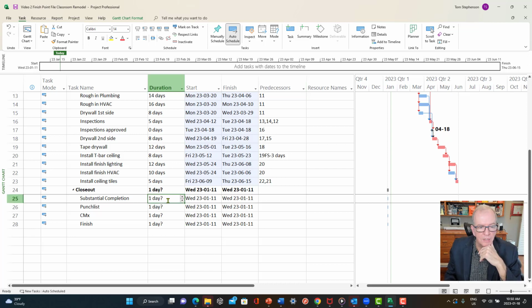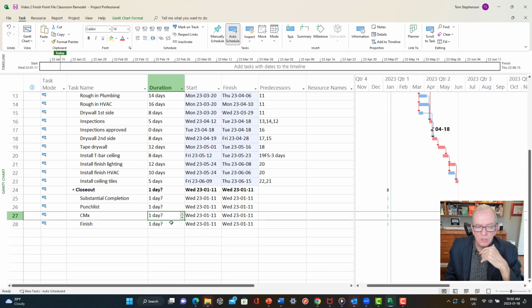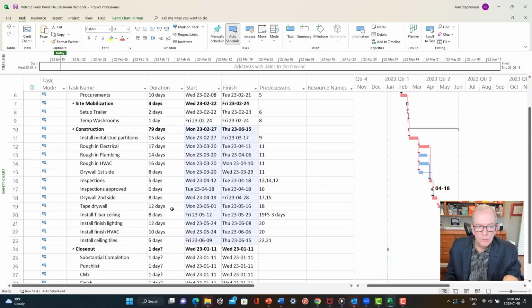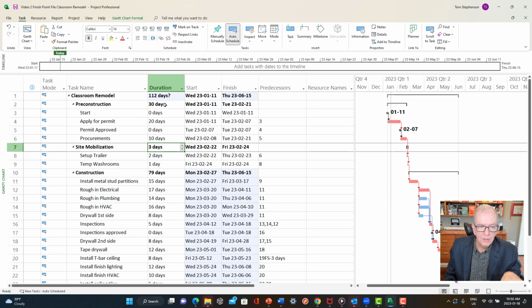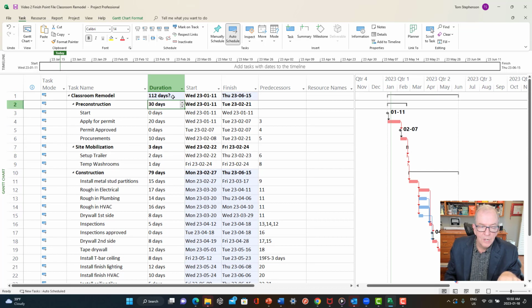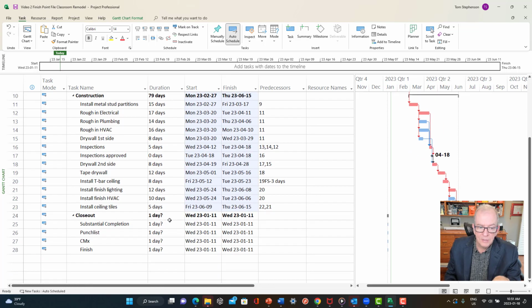You also see that there is a question mark. That just means you haven't entered a duration. So that will follow up. Like I don't see a question mark here. I don't see a question mark there. I don't see one there. I do see here. So that's telling me on the project there's durations that you didn't actually enter. You should go source it to make sure that that's okay. And so in this case, it's not okay.